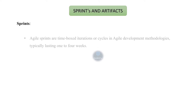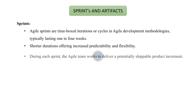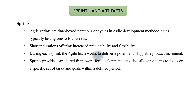The next topic is sprints and artifacts. In agile, sprints are time-boxed iterations or cycles in agile development methodologies, typically lasting one to four weeks, with shorter durations offering increased productivity and flexibility. During each sprint, the agile team works to deliver a potentially shippable product increment.